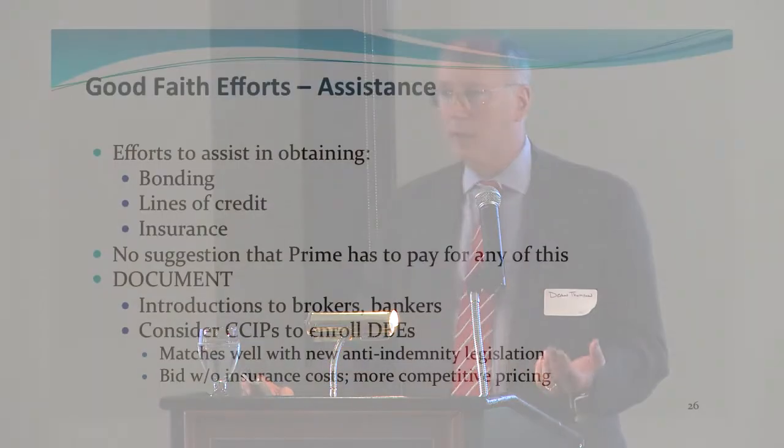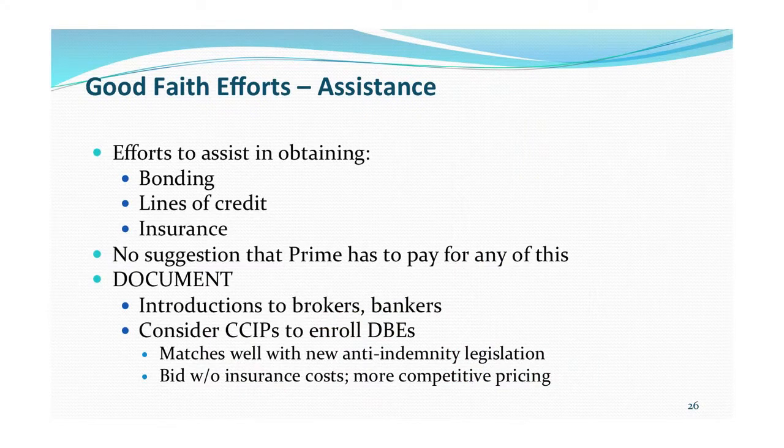You must provide good faith efforts assistance, bonding, lines of credit, and insurance. This is difficult to do. At least you can introduce and have a record of introducing DBEs to your contacts as evidence of good faith efforts. Again, documenting this type of effort is very important.